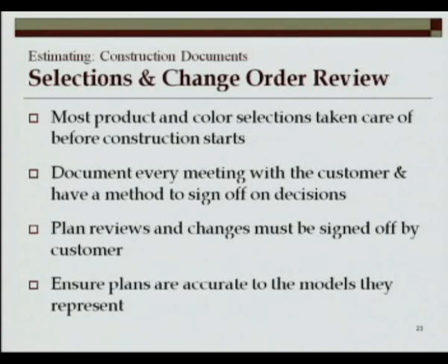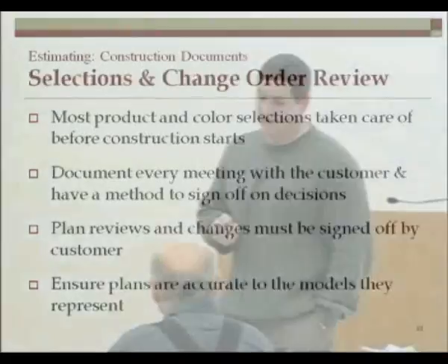Selections and change order review. Almost like we've laid this one in here twice. Get most products and color selections taken care of before the construction starts. Document every meeting with the customer. Have a method of sign off on their decisions. Plan review and changes must be signed off by the customer. And ensure the plans are accurate to the model they represent.